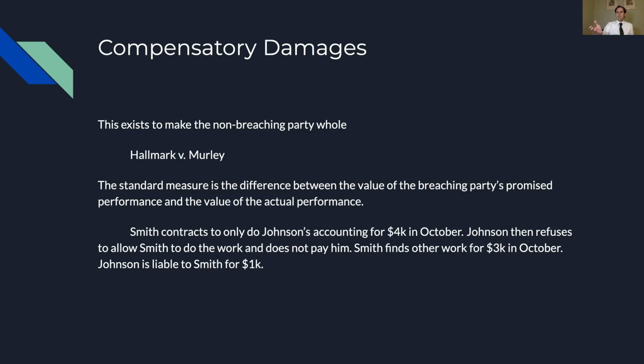Now, I don't get to sue you for 20. That doesn't make any sense. Then I get a free box of cookies. So with this, always look at the difference between what somebody expected to pay and what they ended up paying. Subtract. For you accountants, this shouldn't be difficult. Simple subtraction. 20 minus 10 equals 10. That's what I'm suing you for. Those are my damages. That's how compensatory damages work.